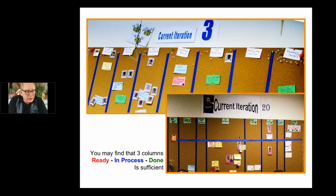One of the ways I've seen with distant teams that wanted to keep track of things moving across in a physical way is the teams always had a web camera open on a monitor in the corner of the room. Whenever somebody moved something on a physical board, they would call someone over, let them know what moved to what square, and have them physically move it. In general, though, the physical boards for teams that we work with are often backed up by electronic boards. So during the current sprint or the current work, sometimes they'll drop down into physical, but they'll usually have an ID that links back to another electronic system.